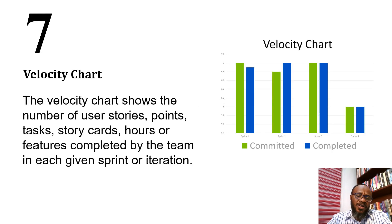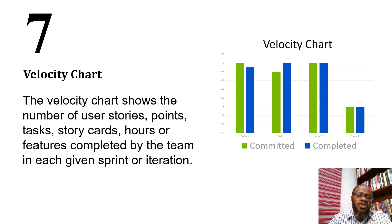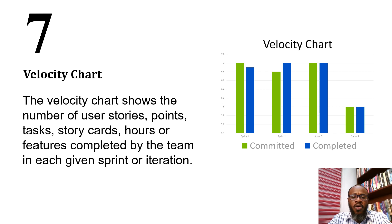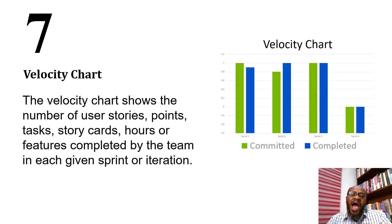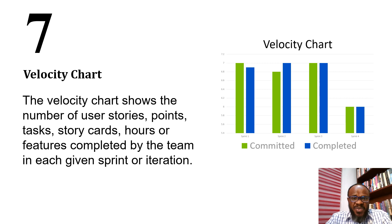With velocity comes the velocity chart. The velocity chart shows the number of user story points, tasks, story cards, hours, or features completed by the team in each given sprint or iteration. It reflects the team's velocity, showing what was planned versus what they were actually able to implement, so we can plan future work accordingly.